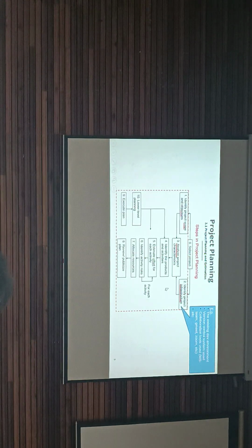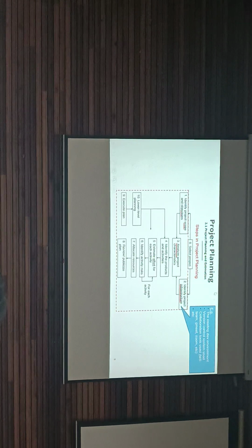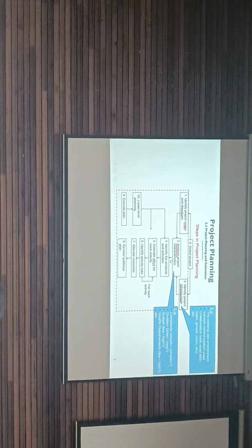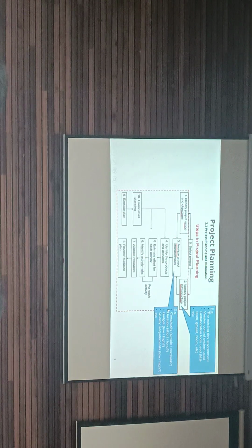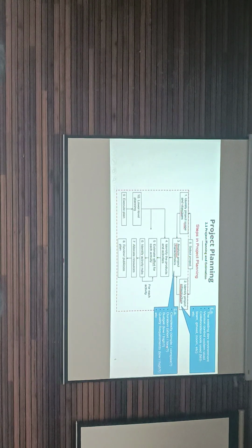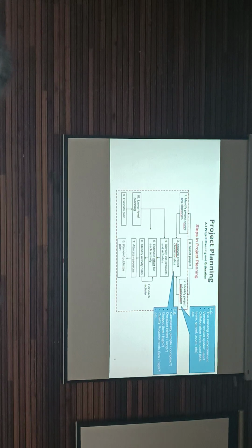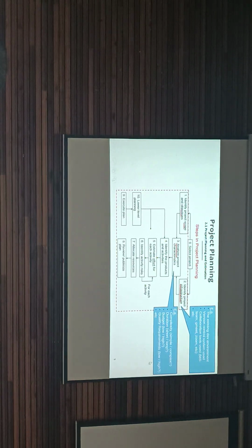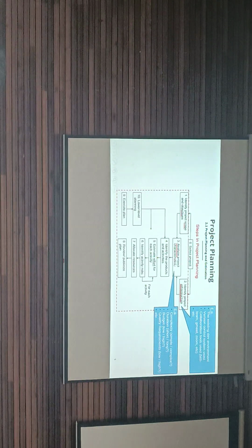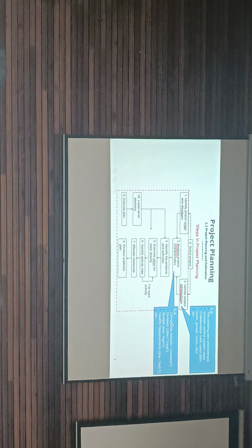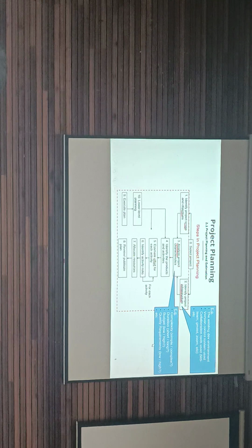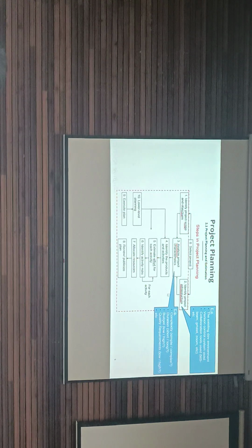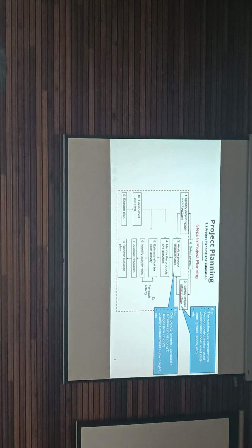Next, you have a project, analyze project characteristics. Analyze in terms of complexity, whether the project is simple or complex, whether the duration is long or short, whether the budget is low or high, whether the quality requirement is low or high, etc. Is it a simple project, short project, with low budget and low quality requirement? Identify them. That also can help you come up with a better project plan.